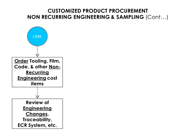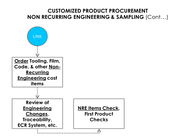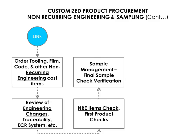Any change or deviation to print that requires officially released data to be updated must be done through your engineering change request. This way, every change is documented and is traceable in the future. Once NRE items have been completed to the stage where products can be produced from them, you need to check the parts. These parts will be the first off from the tools and in general would require some slight modifications before parts being produced are acceptable. Once the supplier is happy with the way that the tooling is operating, they would submit final samples for review, verification, and official sign off by you.